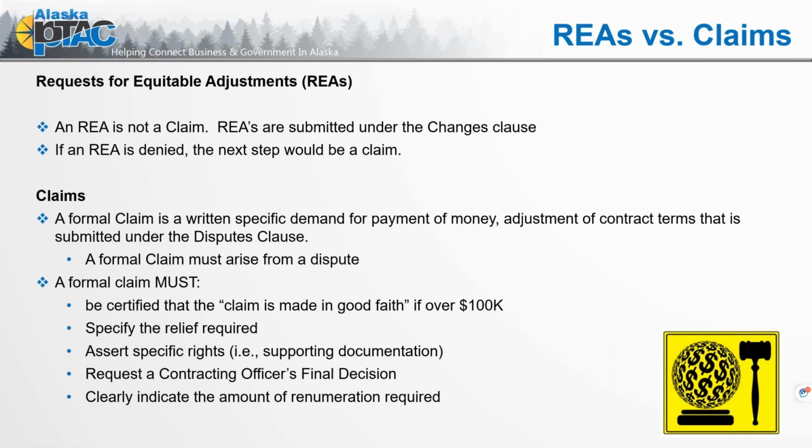So an REA is not a claim. REAs are submitted under the changes clause. If an REA is denied, the next step would be a claim. So let's talk about claims.